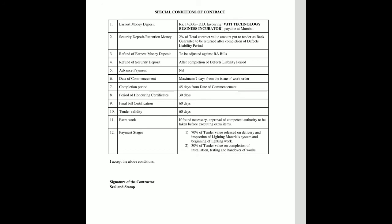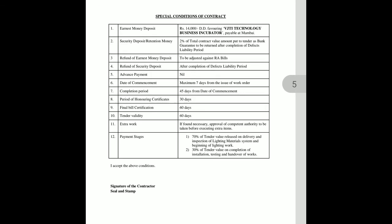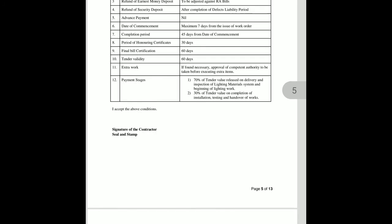Refund of the security deposit occurs after completion of the defect liability period. Advance payment is nil. Date of commencement is 7 days maximum from the issue of the work order. Completion period is 45 days from the date of commencement. Period of the honoring certificate is 30 days and the final bill certificate is 60 days. Tender validity is 60 days. For extra works, approval of the competent authority must be taken before execution. Payment structure: 70% of the tender value is released on delivery and inspection of the lighting material system and beginning of lighting work; the remaining 30% is released on completion of installation, testing, and handover of the work.